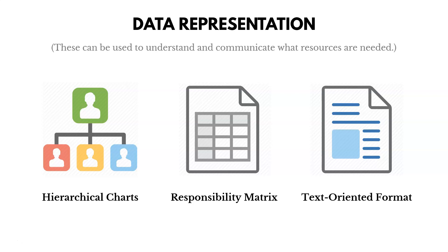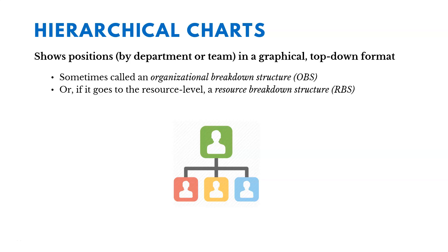Hierarchical charts show positions in a graphical top-down format, arranged according to an organization's departments, units, or teams. This is sometimes called an OBS or RBS. An OBS is an organizational breakdown structure, going down to a department or team level. An RBS is a resource breakdown structure that goes down to an individual resource level.